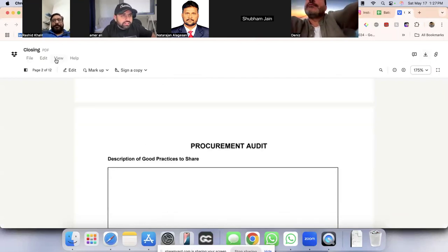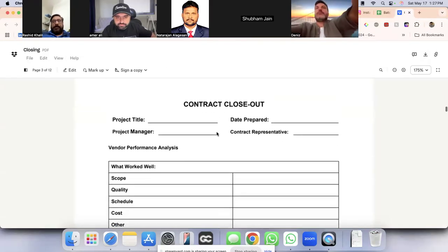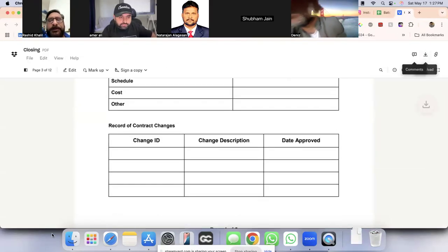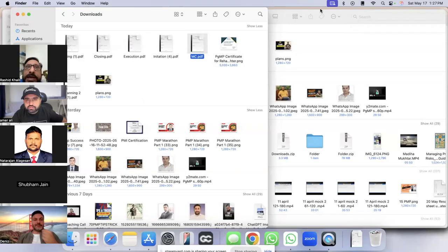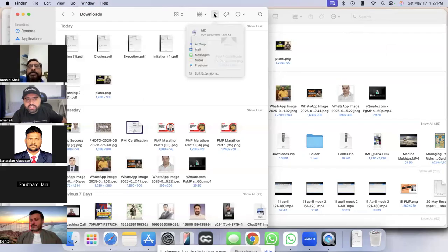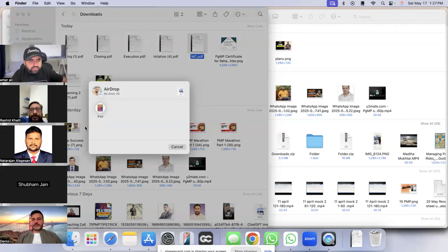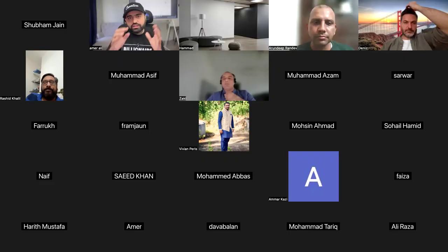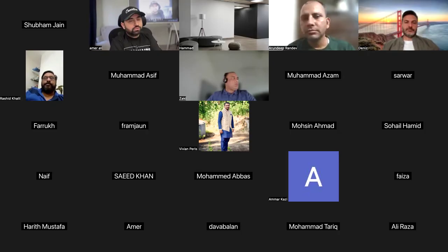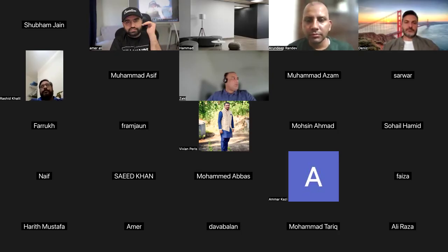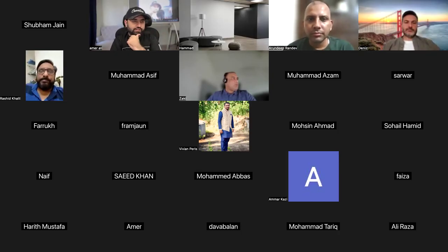Somebody raised the hand. Rashid sir? Yes sir. Sir, can you elaborate the change mechanism in agile projects? Yes, sure. In Agile, whoever raised the change, all the changes go directly to the product owner. The product owner takes that change and puts it into the product backlog. Then it will be prioritized by high value, high risk. If we consider it highly valuable, high risk, we will handle it accordingly. Okay, Rashid sir?